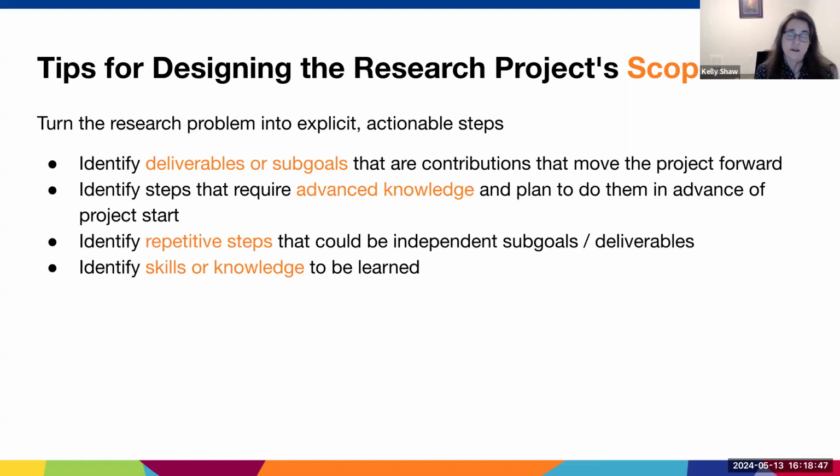of the project start, either you doing them or another graduate student or other student, because you don't want the student mired down in something that is not going to be super productive, when it would take them 2 months to do, and it would take you or a graduate student a week. You want them to really be able to push forward on the project and get a real research experience, both to make forward progress, but so they're also enjoying the experience.